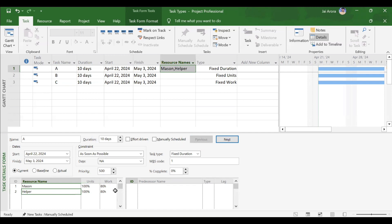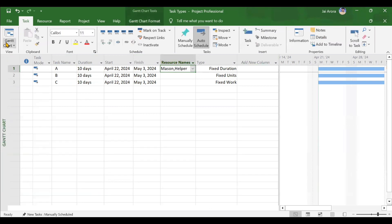For a fixed duration activity, adding any number of resources does not affect the duration at all. Each new resource takes on work similar to the existing resource. It is best to choose fixed duration task type for your activities. The task usage sheet confirms this: earlier Mason worked 80 hours over 10 days at 8 hours per day.